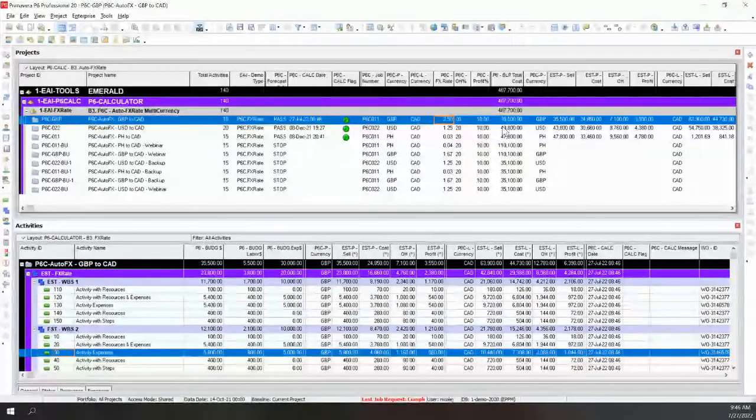Now, a lot of our clients also want to manage the cost of doing a scope of work. They want to manage the rate that they're selling this to the client. That would be a contractor scenario or a manufacturer scenario most often. So usually you've got the base cost and then you add certain things on it. In this example, I've got 20% overhead and 10% profit. That's being added from the cost to the sell, those two percentages. Again, I'm showing it as a bulk, but it doesn't have to be.